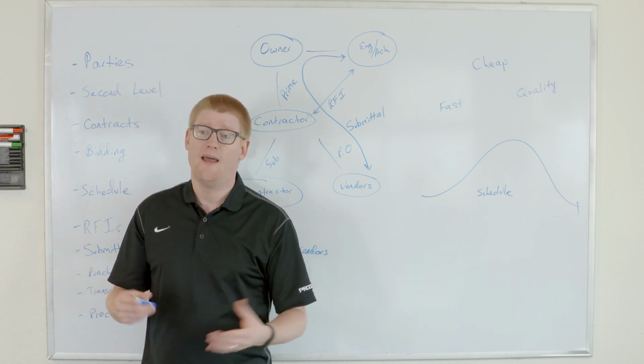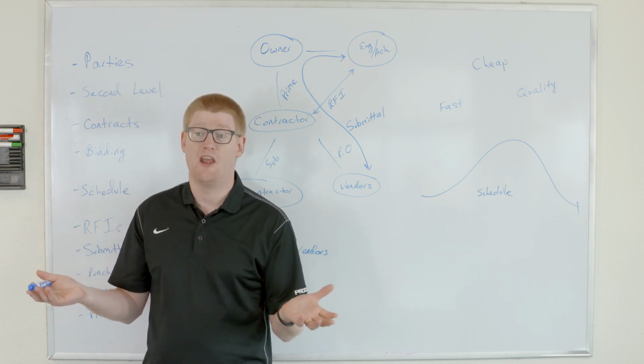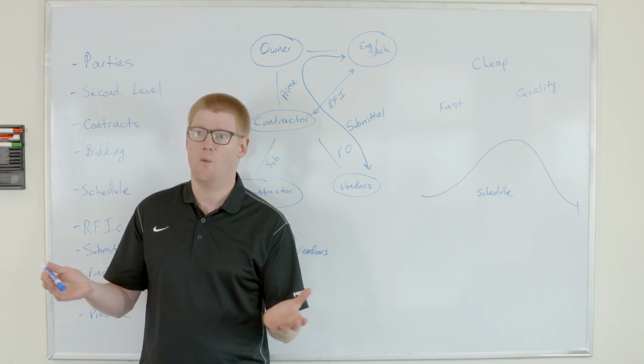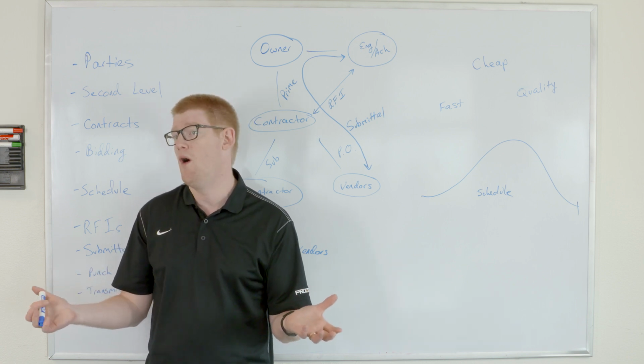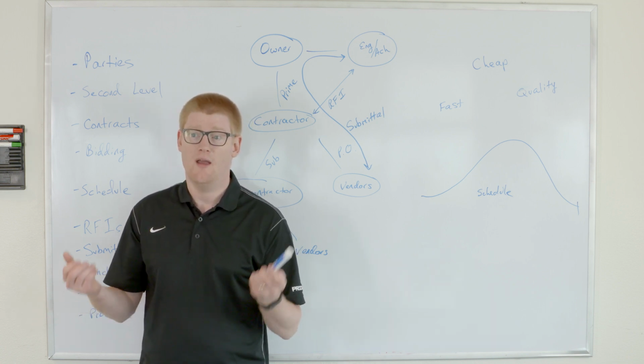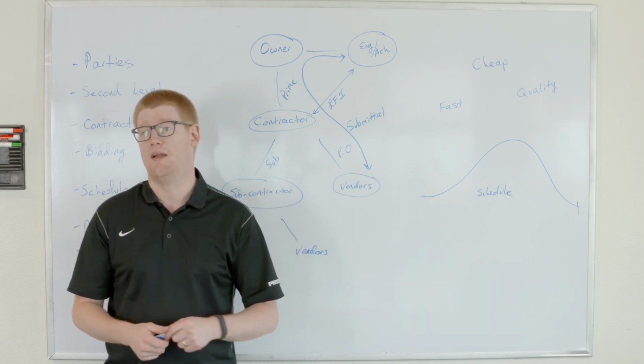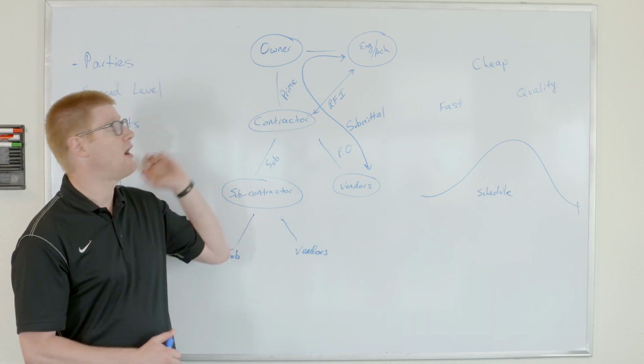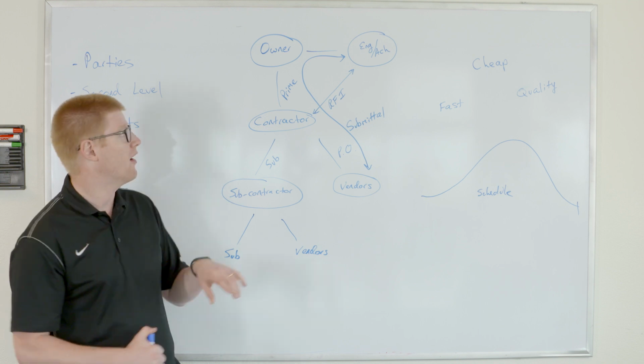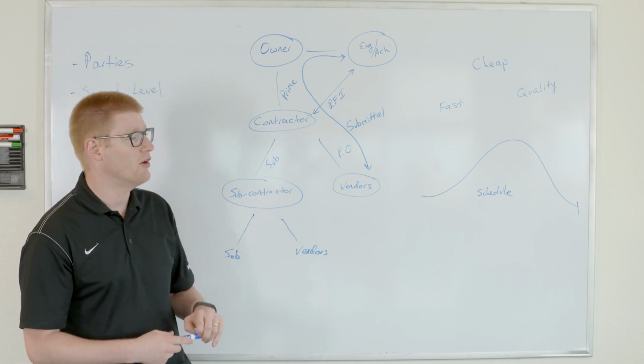We were talking about that light. A chandelier may fit the specifications for what they need. It may be the right weight, give off the right amount of light, and use the right wattage. But it may look ugly. So the owner may have a buy-in on what that's actually going to be. So it's not uncommon for owners to be involved with the submittal approval process. And of course, our engineer and architects.